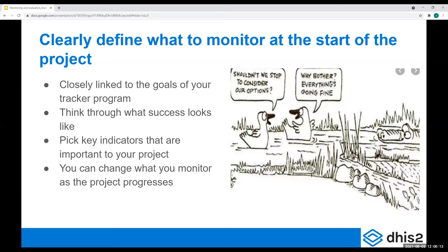Many things you could monitor you'll figure out if you have a couple of key indicators that you monitor all the time. If you see that data never comes in on time, you should always do some investigation when the results from your monitoring aren't what you expect. Maybe the numbers aren't coming in because nurses are lacking devices, so you make that phone call to your district managers. Or perhaps the system is always lagging — maybe that's an indication that for a period of time you should pay close attention to your server performance. You don't have to monitor 100 different things at all times; adjust as you go and monitor problematic areas more closely until you fix the problem.